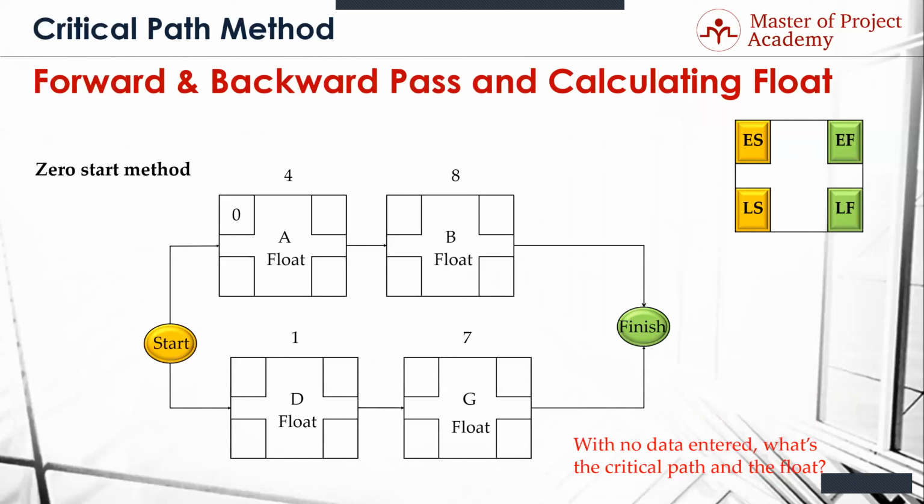We're going to start at day 0. Now, this is somewhat controversial, but that's the way I teach it now. It's less math. Some people have heartburn because 0 is not really a day, but pretend it's a stopwatch or a starter's pistol. So all this is a mark in time. We're going to start our project, bang, start. The duration of this project is 4 days. So we're going to take our 0, which is our early start.